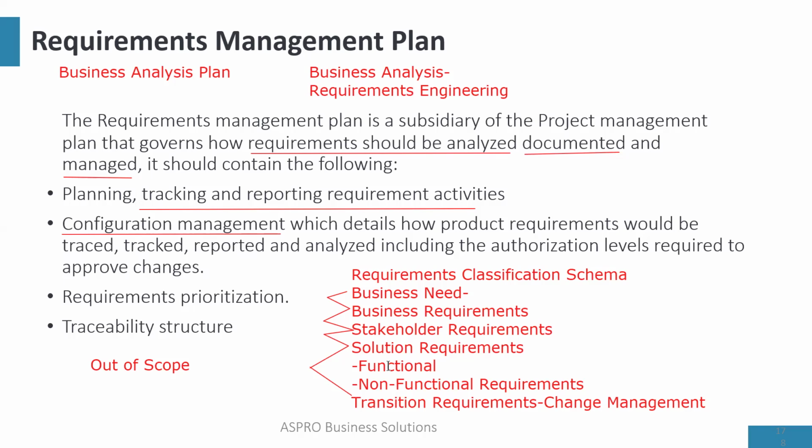So traceability is just like, where is this requirement coming from? If I can't trace it, then let's drop it because it's not going to add any solution. It's not adding to the business need. Okay, I hope we got that.